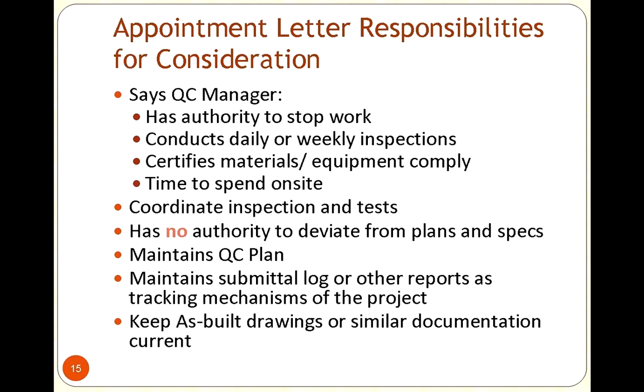I'll go back to that example I gave a little bit earlier where it was these boxes that were drilled on a board, drilled to the wall. The project manager, they weren't quite done with the work. They were about 95% done. Well, the guy who was my quality control manager, he saw the problem, recognized that the specification was not being met, and then he had the work stop. and the contractors lost their minds because they didn't understand what was going on. They get mad at my guy, and so I come in to defend him and say, look, he has the legal right to do this.